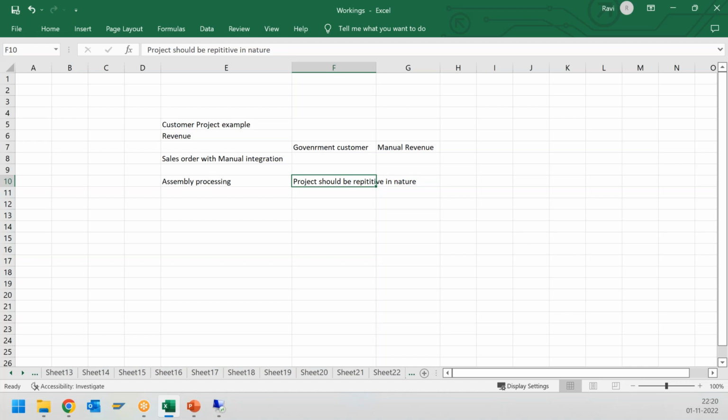For example, you are working in an IT company and you are doing an implementation project, for let's say SAP or any IT implementation. What should your project structure be? You know that there are 5 phases in my SAP project implementation. Each phase has 10 activities. I need a license, a system provisioning, a number of resources. So cost can be a factor, but I know all this structure will remain the same whether I do one implementation or 100 implementations, right? So it means it is repetitive in nature.